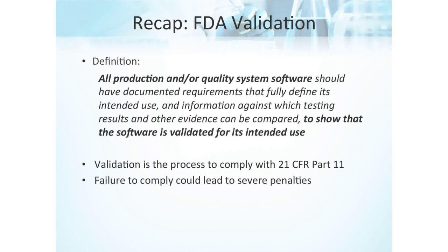Your source code availability, you need to show that it's locked down, but it's available. System and acceptance testing has happened, and it was following a consistent method that was properly trained by the employees who were running it. And hardware and software change control processes. This one's huge. You've got to show that you have rigorous and tightly controlled management of changes. So that means documentation and processes followed and executed by properly trained employees.